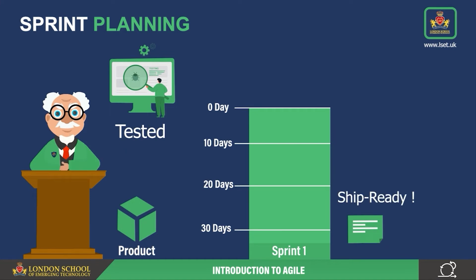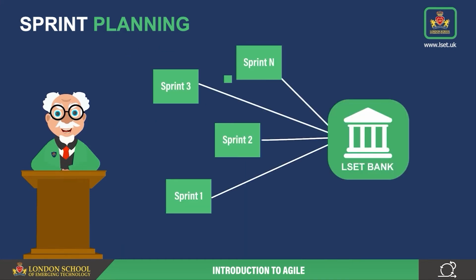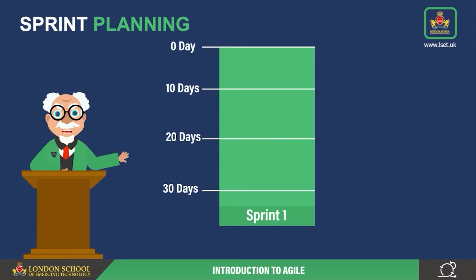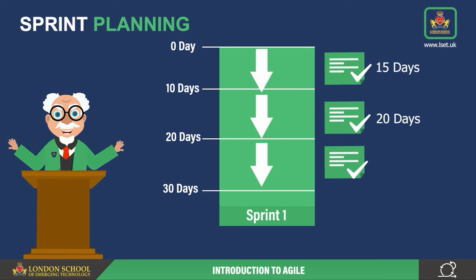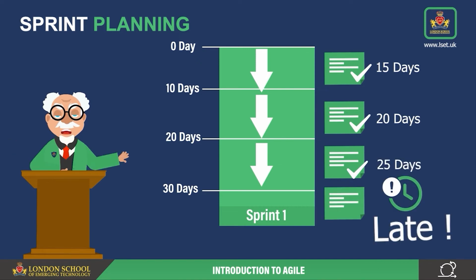By the end of each sprint, you should have a thoroughly tested product with all the features of the sprint, 100% complete. Due to the fact that sprints are a concise but realistic representation of parts of the product, a late sprint finish is a good indicator that the project is not on schedule and that something needs to be done. Therefore, it's extremely important to monitor the progress of each sprint very closely.